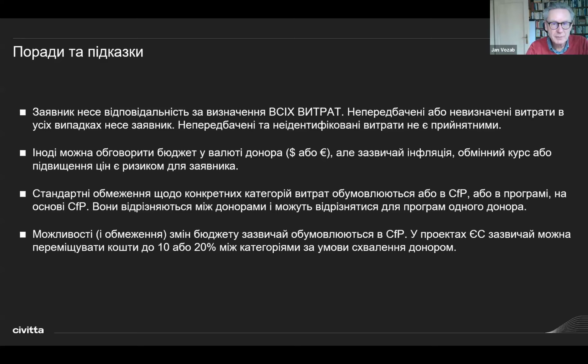So if you find out that quite large sums of your cost items are not eligible, you may decide, even before the budgeting exercise, whether you want to go for the project and prepare the application, or whether you stop working on the project because you would receive just very tiny amounts for the project, and the rest you would have to pay by yourself because of a large amount of non-eligible costs.